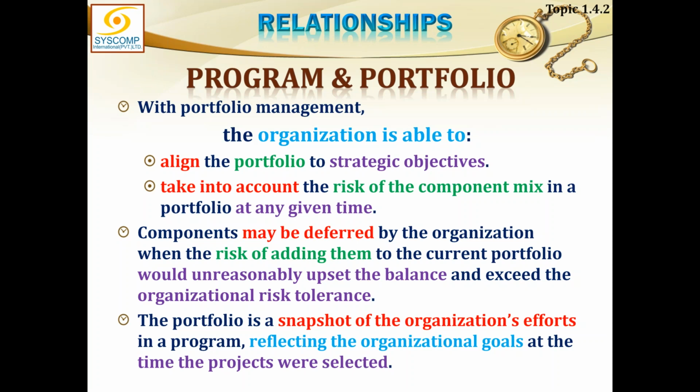Components may be deferred by the organization when the risk of adding them to the current portfolio would unreasonably upset the balance and exceed the organizational risk tolerance. This is a very, very important lesson here. If your organization cannot afford to take the risk of another project, why are you doing that?